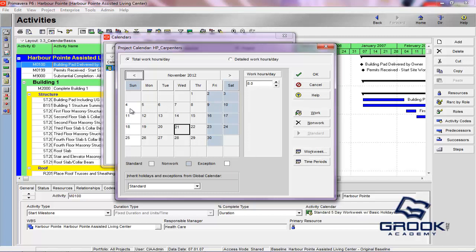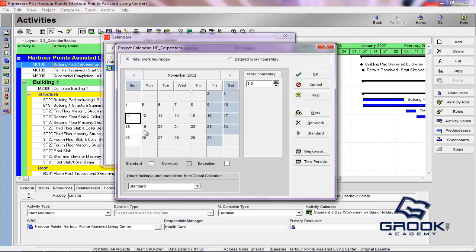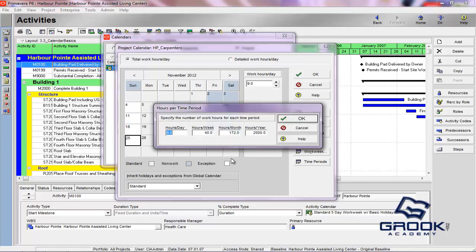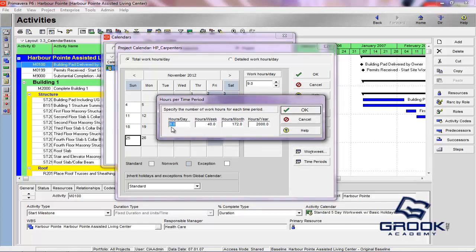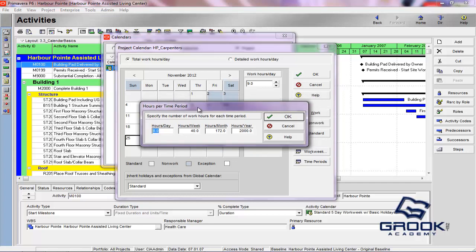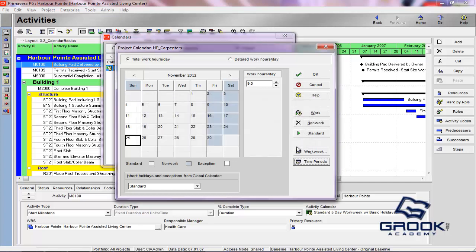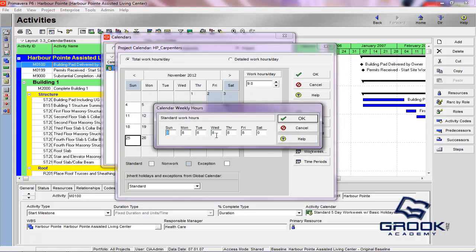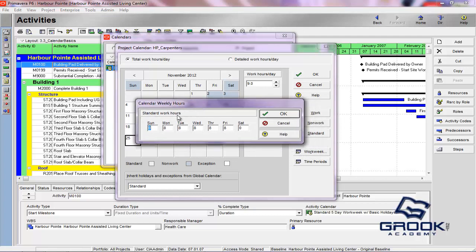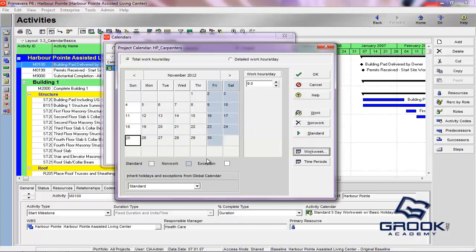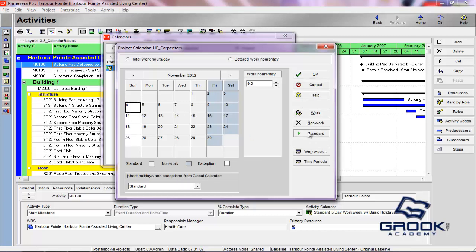Now, you can turn their work hours up. You can say they're going to work nine hours on Sundays. Once again, you have to apply this to all months that are applicable. And I believe here you can set the hours per time period. So you would say they work eight-hour days, they work 40 hours a week. This is specific to the calendar. And you can also do it this way by calendar work weekly hours. And you can see that we would want to put eight here. And we want to take Friday off. So they take Friday and Saturday off. We want to set these as standard work days.